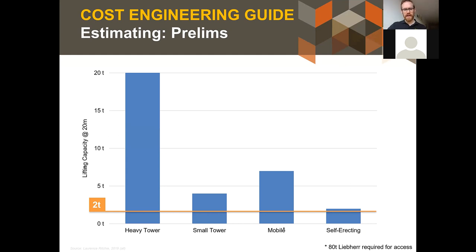Looking at the craneage, we already know that timber solutions are lighter than the reinforced concrete solutions. So it makes sense that we might be looking at reduced craneage just because our panels and our elements are going to be lighter. If we say our maximum panel weight is typically around 2 tons, it might get a little bit higher than that, but normally that's the maximum weight. Throwing a heavy tower crane at it, a Favco 380D, a big expensive tower crane, isn't really necessary unless you have access requirements, or if you want to lift multiple panels at a time. It's using a cricket bat to kill a fly, essentially,